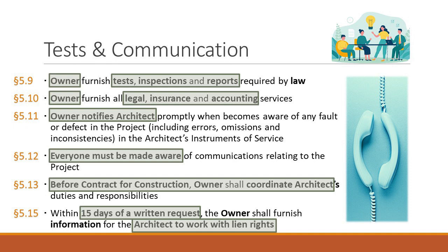is, okay, I now negotiate this owner-architect agreement. And the architect starts designing, and I put that on my shelf in my office, and it sits there. And then 6, 8, 10 months later, after the drawings are done, we bring in the contractor and we negotiate that construction contract. What this says is, before we finalize this construction contract, I have to pull that architect agreement off the shelf. And I have to look at all the provisions that changed from the standard boilerplate language. And if they affect how this contractor thinks the architect is going to work, I have to update it there.